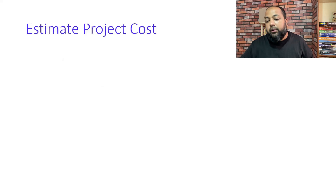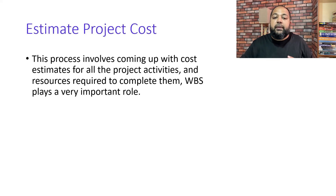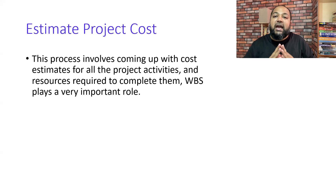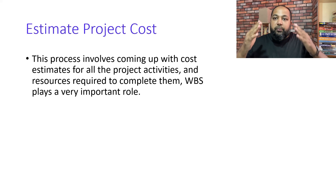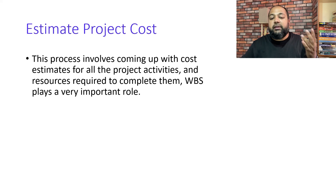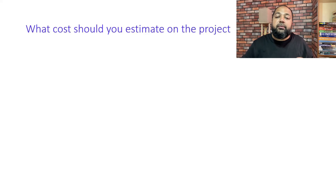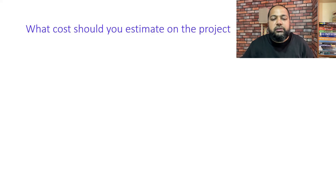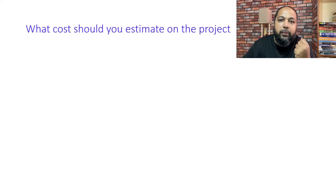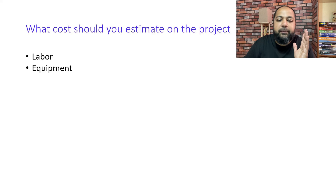These are many reasons why we need to estimate projects. The estimate project costs process involves coming up with cost estimates for all the project activities. All project activities come from the scope baseline — the Work Breakdown Structure — so we have to estimate all project activities and resources required to complete the work. The WBS plays a very vital role in this.